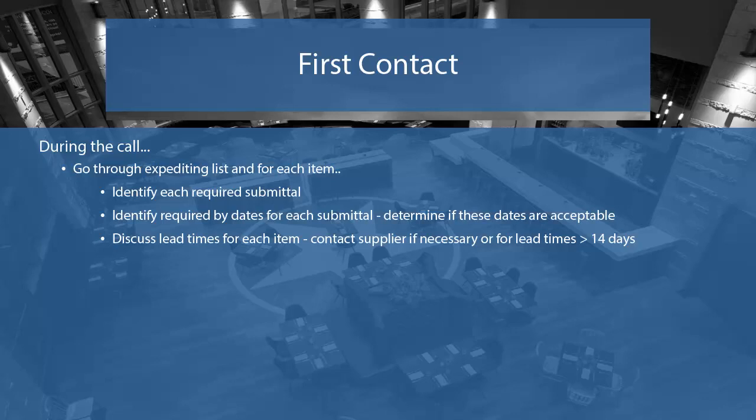If the subcontractor does not know the lead time for an item, then look in the payments database to find out who the supplier of the item is, then contact them to determine the lead time. It will be necessary to update these lead times in Endeavor either during or immediately after the call. Another thing to consider is to build longer lead times for items containing submittals that are likely to be rejected, such as those with project-specific structural shop drawing requirements.